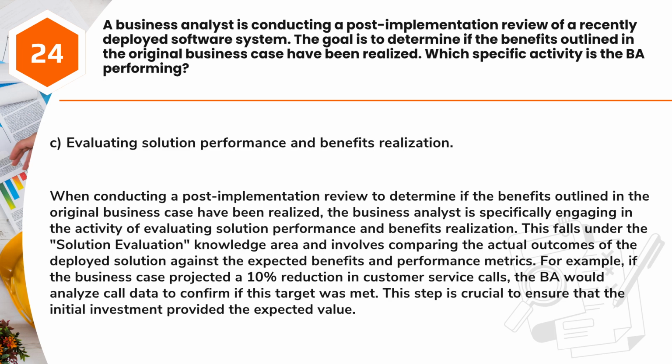Answer: C. Evaluating solution performance and benefits realization. When conducting a post-implementation review to determine if the benefits outlined in the original business case have been realized, the business analyst is specifically engaging in the activity of evaluating solution performance and benefits realization. This falls under the solution evaluation knowledge area and involves comparing the actual outcomes of the deployed solution against the expected benefits and performance metrics.